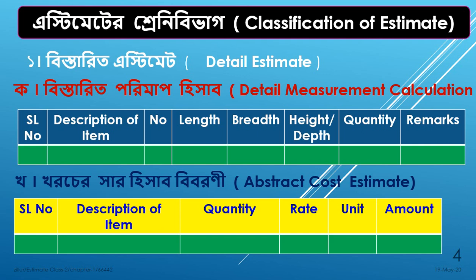The amount is calculated as quantity multiplied by the rate. This gives the total amount for each item. You can see the total amount in the estimate. If you have any questions about this, please comment.